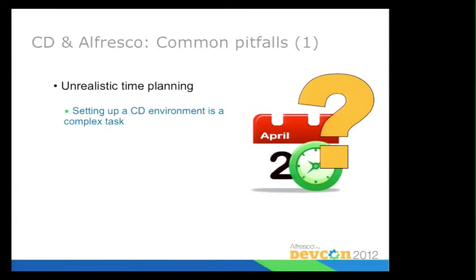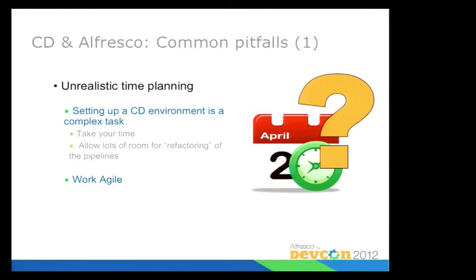So we planned 6 months to actually set this up. It took us almost 9, so it's not too bad. But still, you have to consider that it's a very resource-intensive thing. And you need lots of refactoring, because the first time that you do it, you're not going to do it right. So it's something that is actually really a bit like a software project itself.